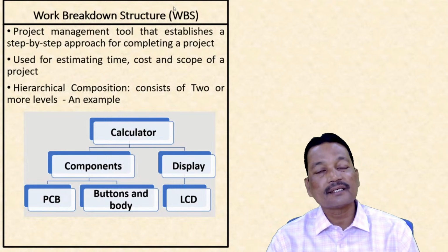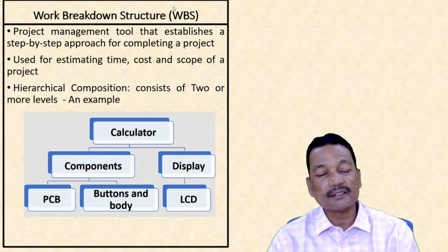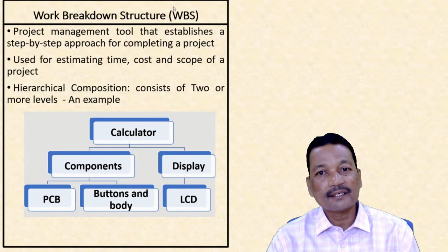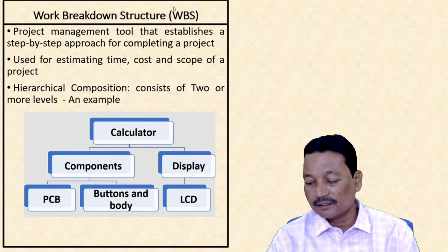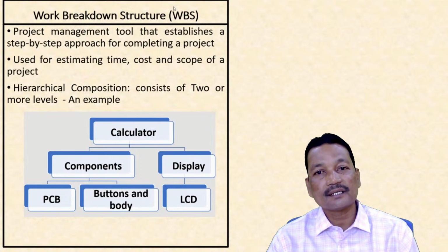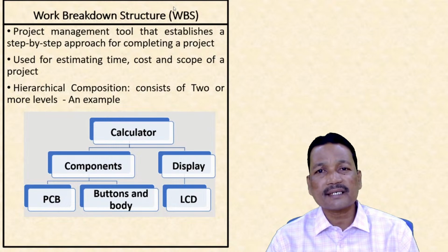The main project, our writing table for one person, is level 1. Below that, the various components used for creating the table, that is 1, 2 and 3: the iron frame, the wooden writing board, and the screws, is level 2. So here we can say, yes, it is a simple thing. Only 2 levels are there.